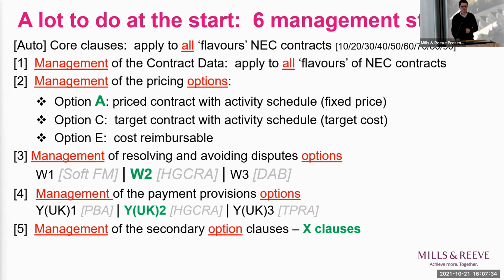NEC suite. Number 5 is a thorny thing to bear in mind, and this deals with the X clauses. And you'll see at the top of the screen that I've referred to core clauses. The other important thing that you ought to ensure that you take into account when setting up your contract is which X clauses apply to your project. These are secondary, clue in the name, option clauses. They don't apply automatically. You have to tick the box for those clauses which are relevant for you.